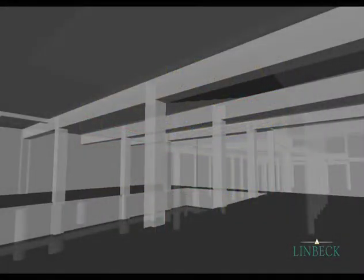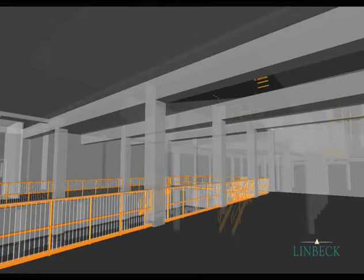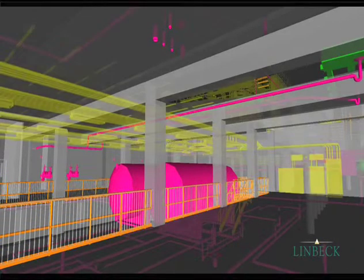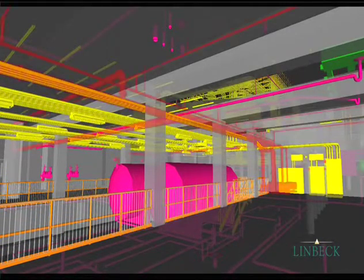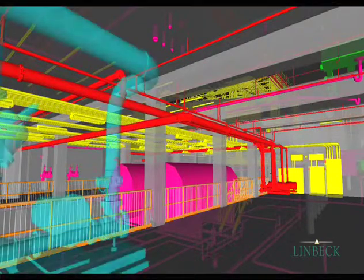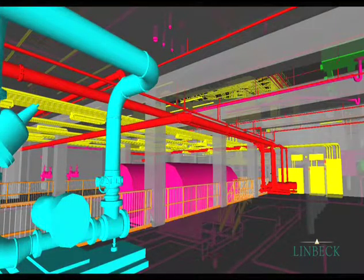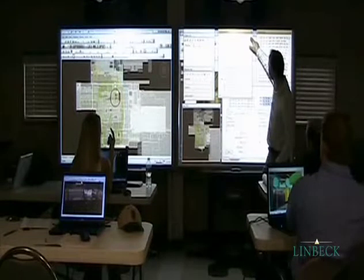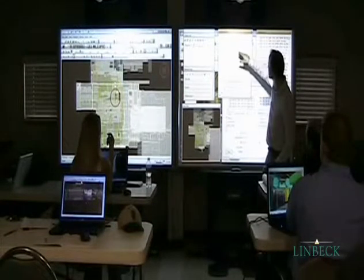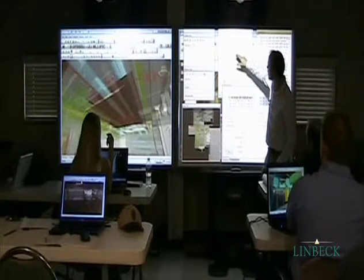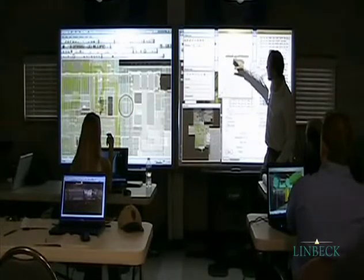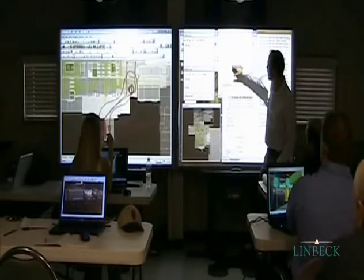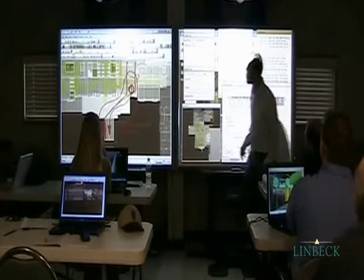Clash detection begins with 3D model contributions from all major BIM participants. Models are combined and reviewed for any clashes or coordination issues. Team collaboration is a major component of our coordination efforts. We leverage the expertise and experience of all project participants to accomplish the most efficient and effective coordination possible. Weekly BIM coordination meetings are the primary platform for this collaboration.